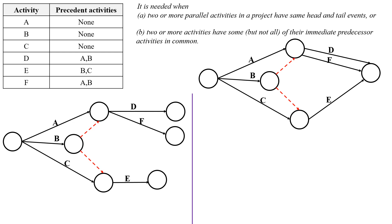Here observe the activities D and F are parallel activities, which means these activities have the same head and tail events. In this condition, we have to introduce one more dummy activity like this.